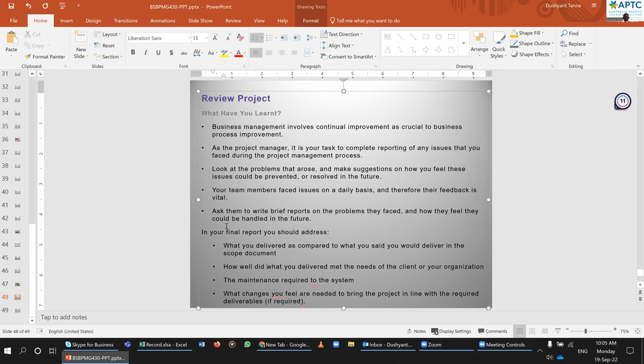In your final report, you should address what you delivered as compared to what you said you would. It's like politicians: before an election, they promise something, and after a few years we need to evaluate. This is what you said on 1st of January 2019; have you delivered those? That's why the scope document is very important. How well did you deliver, did you meet the need of your client, what maintenance is required for the system, and what changes do you feel are needed in the project in line with the requirements of the deliverable?